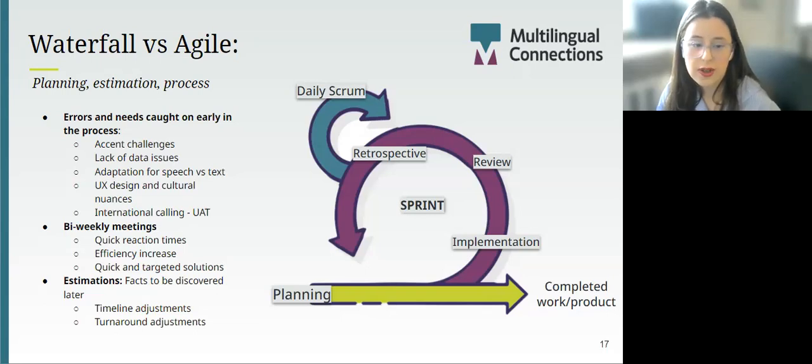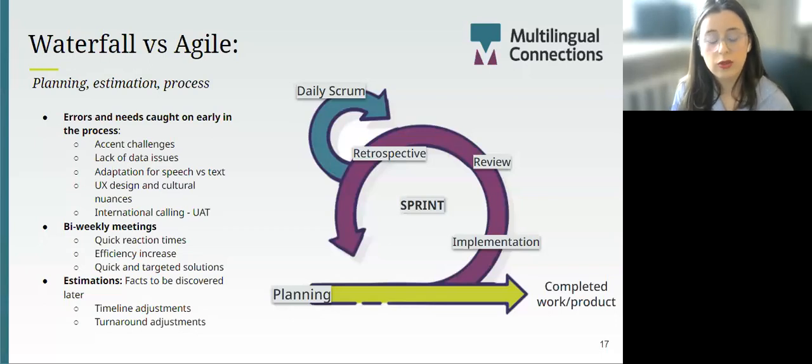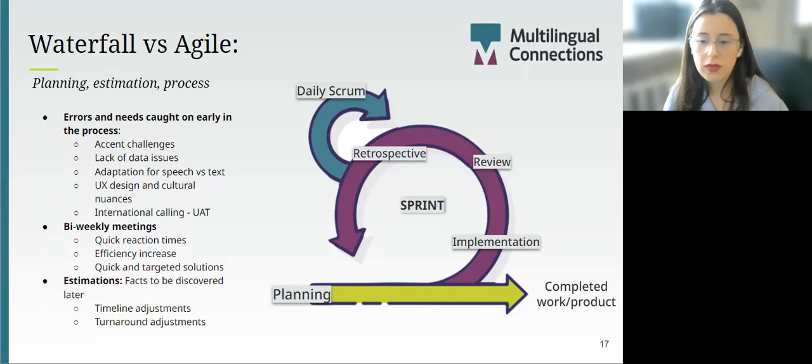And every estimation after the first sprint uses this historical data with the first sprint to base the estimations in the next sprint. And in our case, the development team already left room for change because of this principle, and we readjusted everything that would allow for a potential change and a more healthy work balance on the linguist side as well. For example, we had to do it once for Spanish and the rest followed course because they quickly realized that they might not have got the estimates right for the rest of the languages as well.